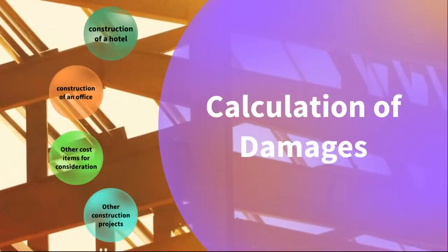It is a key factor of liquidated damages that the amount must be a genuine pre-estimate of the loss. The calculation of the stipulated sum in the contract is very important because the court may deem the damages as a penalty if it appears to be deterrent rather than a compensation to the non-defaulting party. The amounts construed as a penalty will be